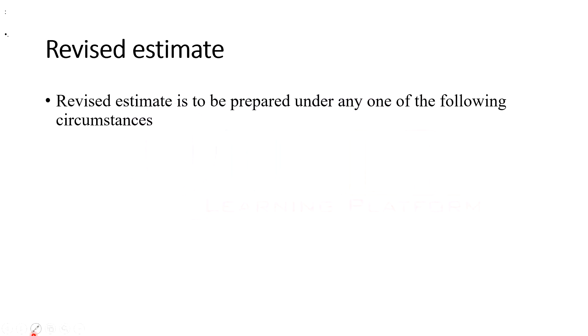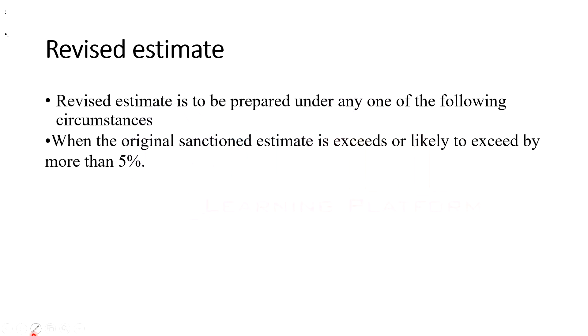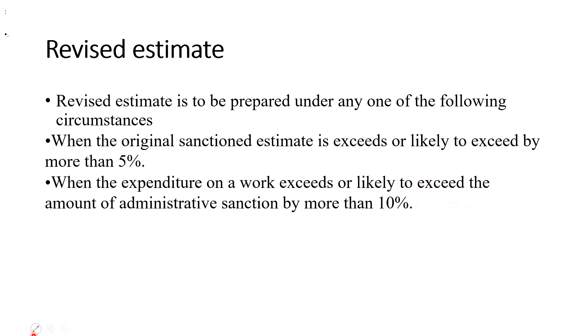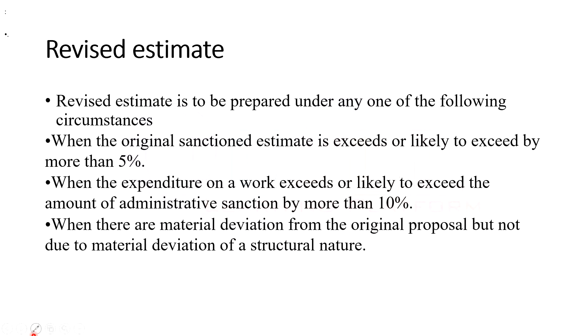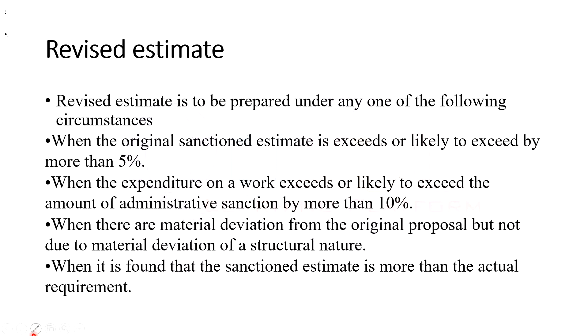A revised estimate is prepared under any of the following circumstances: when the original sanctioned estimate is exceeded or likely to be exceeded by more than five percent; when expenditure on the work exceeds the administrative sanction by more than ten percent; when there is a material deviation from the original proposal not of a structural nature; or when the sanctioned estimate is found to be more than the actual requirement.